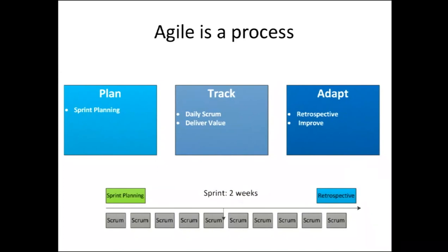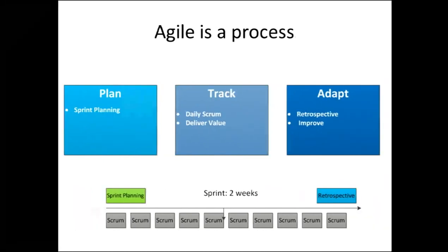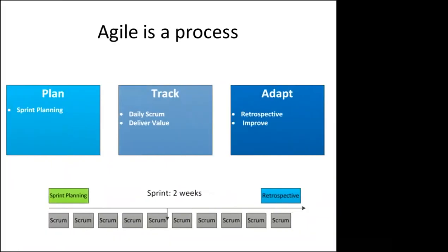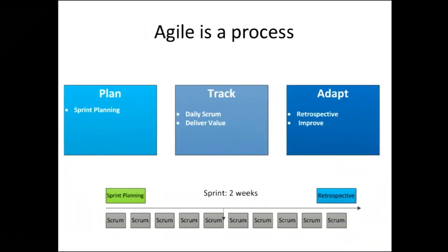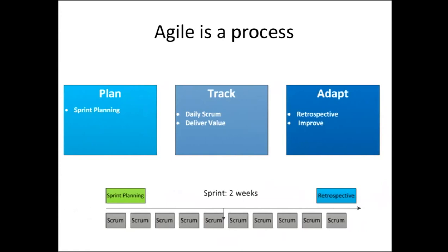And then each day there is what they call a scrum meeting or stand-up, where your whole team gets together and looks at this board and sees what's in progress. Do you have anything that needs attention? Do you have something that's been sitting in progress that needs to move? Why is it sitting in progress for a whole week when maybe it was supposed to only take a day? And then, are there any bottlenecks?